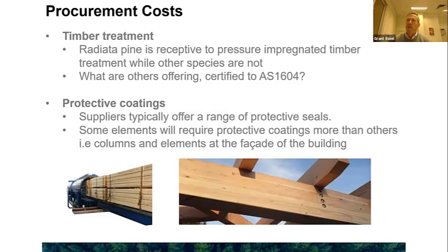The alternative to this that I've seen offered is more of a topical protection, where it's actually just a veneer that's protected, and it will require some ongoing inspection, certainly ongoing costs to actually maintain. So you've got to think about the legacy cost of that as well.